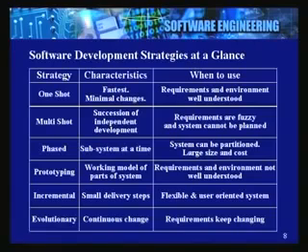The next particular approach can be multi-shot. The multi-shot approach is different from the phased activity in the sense that you look at only a very narrow segment one at a time, and then go to the next segment, not looking beyond the frame of reference that you have in mind. But there are other types of strategies also.